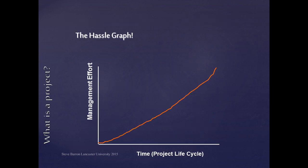If this is not done with limited management effort invested at the start of the project, the learning curve becomes shallow, resulting in the need for significant redesign, rework, and wastage. These demand additional management effort as the project progresses, resulting in increased costs and timescales — all because insufficient management effort was not invested at the start.